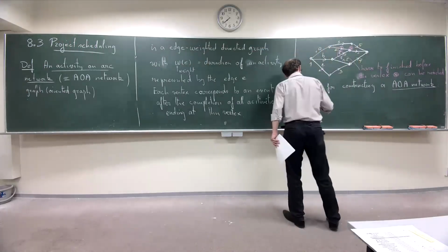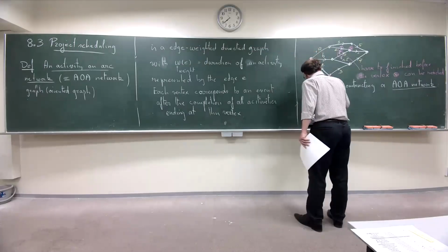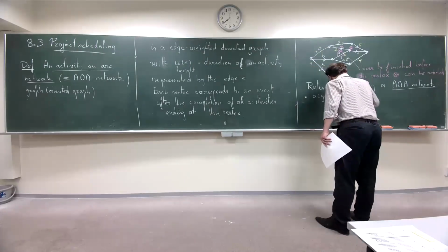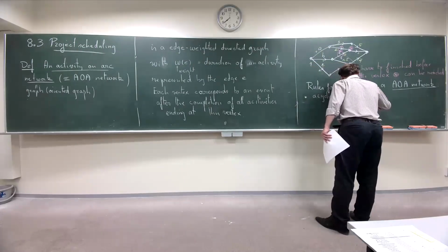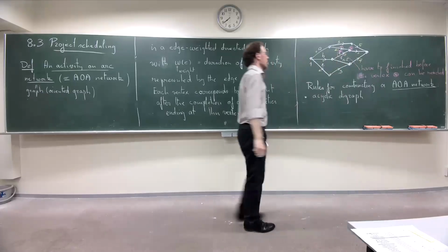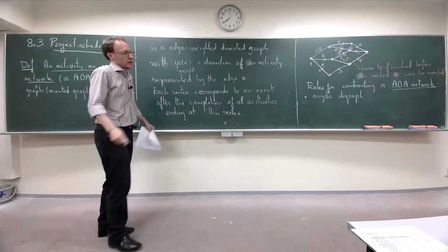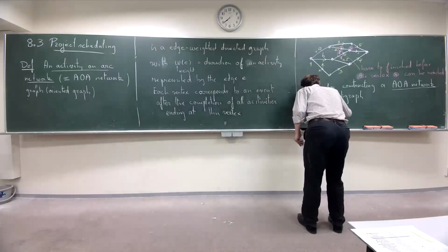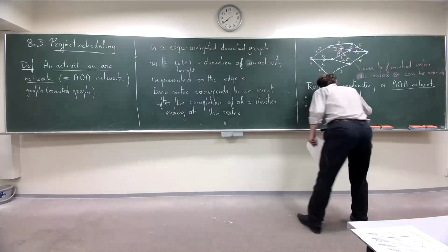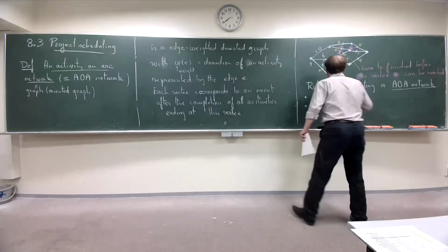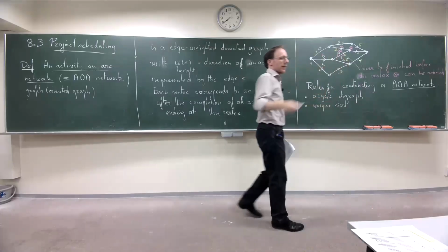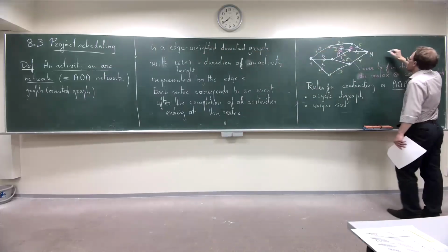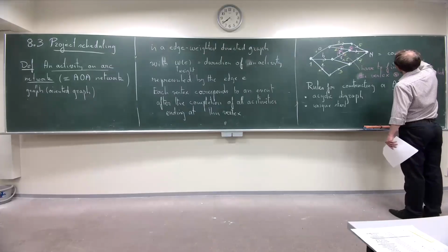First, it should be an acyclic digraph, which means an oriented graph. You don't want any cycle because it's meaningless. There is a unique start, which is a start here. You start any activity, and there is a final unique point which corresponds to the completion of your work.